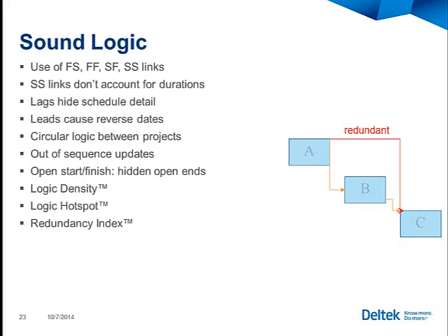You can start 5 days after me. Well, what happened in those 5 days? What's the milestone that needs to be accomplished in those 5 days? Let's define it that way instead of just saying, hey, 5 days after I start, you can start. Well, what if I didn't do anything for 5 days? Can you still start? Those are tough questions. They're not always easy to answer, but they need to be answered. Circular logic, out-of-sequence updates where the work's not really being done in the order that it was sequenced in. We have to start asking why. Open ends, when I'm using start to start, finish to finish.